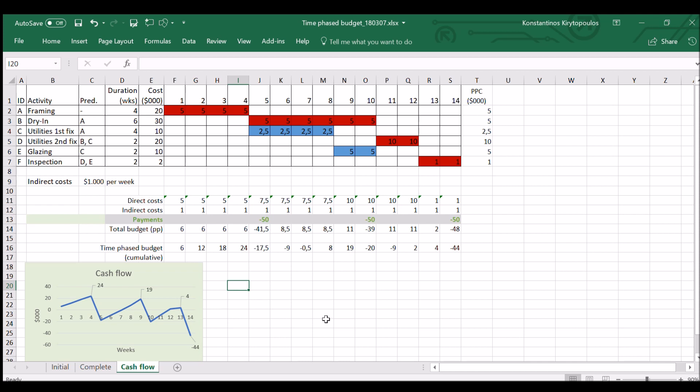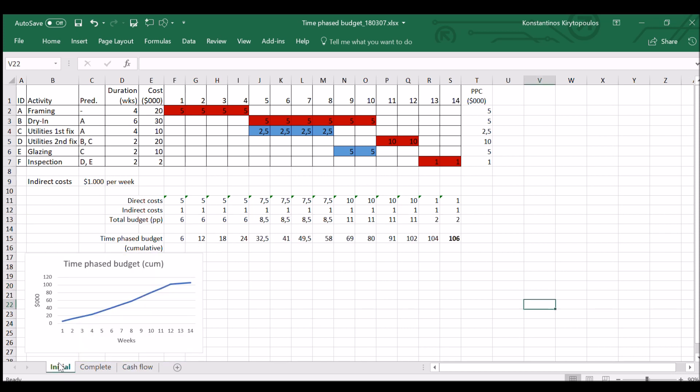And that would be the difference between a cash flow, where I take into account when the money is really spent and any inflows, any payments that I get, versus the time-phased budget where I only have expenses and practically do not put in when exactly the money is spent, but when I am committed to spend that money.